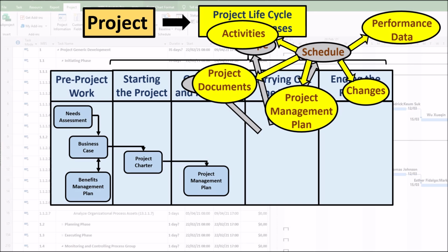In some cases, project schedule delays may be so severe that a new target schedule with expected start and finish dates is necessary to provide realistic data for directing work, measuring performance, and evaluating progress. This ends the video on schedule management during the execution phase.